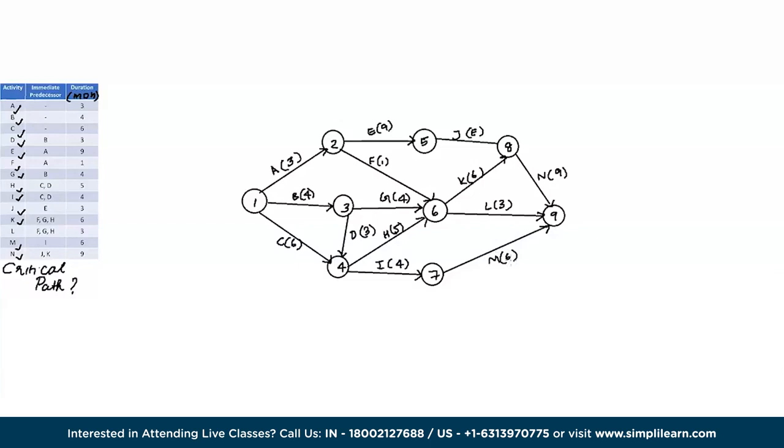And now let's find out how to create the critical path. To determine the critical path, we need two paths, the earliest start times and the latest completion times, which are both represented by ES and LC. The earliest start time refers to the earliest starting times of each node. Likewise for latest completion time. So each node has its own earliest start time and latest completion time. They are represented in a box.